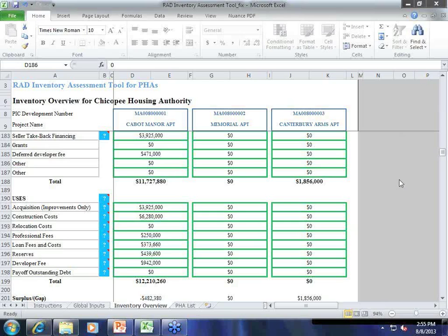So you really could keep going with some of the improvements that you're doing now, and you'd still be able to count those in your tax credit basis when you do that transaction. So if you're thinking about doing 4% credits, you'll want to talk to bond counsel sooner rather than later. Okay. Yeah. No, we need to do 4% in order to cover the financing gap that we have. Okay. Well, then you'll want to talk to your bond legal counsel. Ask them, do you need to have a bond inducement resolution in place? And I think they'll probably say yes. And the sooner you can get that in place, the more of the costs that you're currently expending can be included in the refinance.